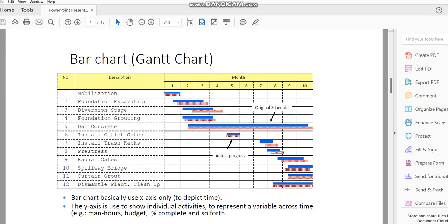Okay, so what we need to do is, let's say using the work quantity, foundation work is going to take us 2 months. So each month we're looking at finishing 50% of the work. Then what happened in month 2? You go back and look at all your work quantity that has been done, how much soil has been moved away. Then you will know that we've moved away 70 tons. So it means that at month 2, 70%. So you key in Microsoft Excel, or you have to draw up to 70%.